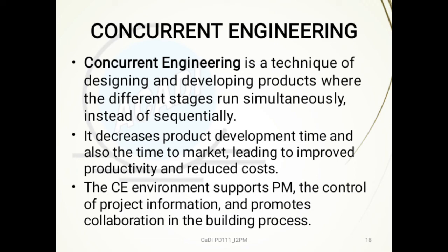Concurrent engineering. This is a technique of designing and developing products where the different stages run simultaneously instead of sequentially. It decreases product development time and also the time to market, leading to improved productivity and reduced cost. The concurrent engineering environment supports project management, the control of project information, and promotes collaboration in the building process.